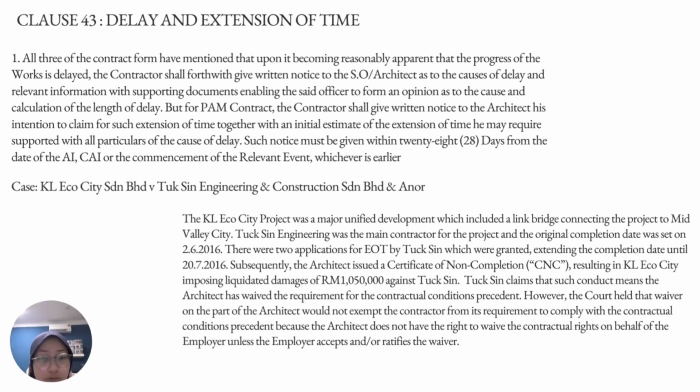liquidated damages of 1,050,000 against Tuxin. Tuxin claimed that such conduct meant the architect has waived the requirement for the contractual condition precedent. However, the court held that waiver on the part of the architect would not exempt the contractor from its requirement to comply with the contractual condition precedent because the architect does not have the right to waive the contractual right on behalf of the employer unless the employer accepts and or ratifies the waiver.